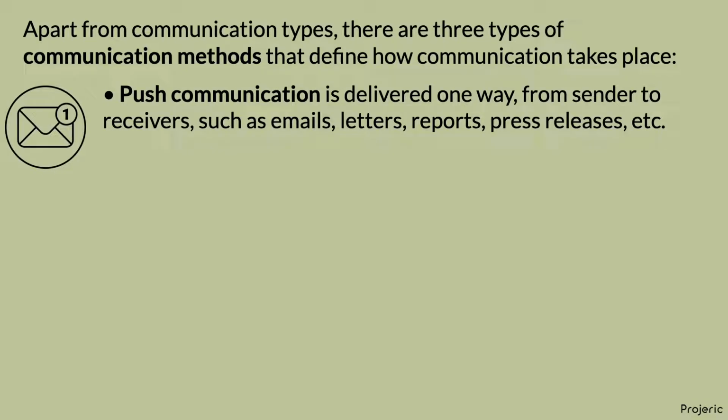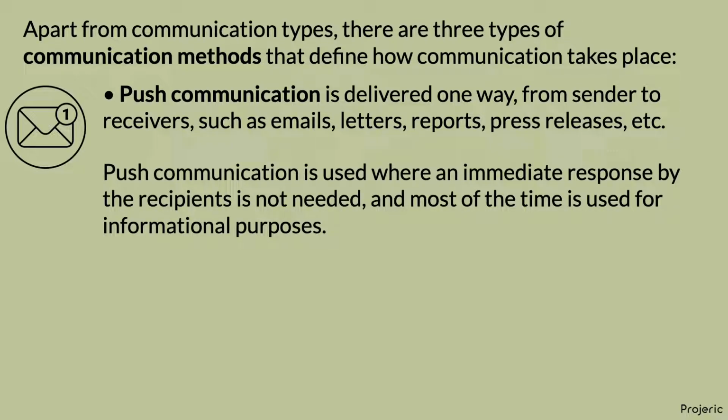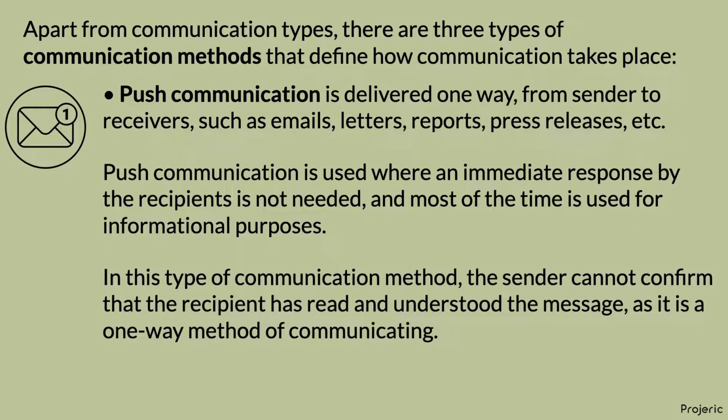Push communication is delivered one way, from sender to receivers, such as emails, letters, reports, press releases, etc. Push communication is used where an immediate response by the recipients is not needed, and most of the time is used for informational purposes. In this type of communication method, the sender cannot confirm that the recipient read and understood the message, as it is a one-way method of communicating.